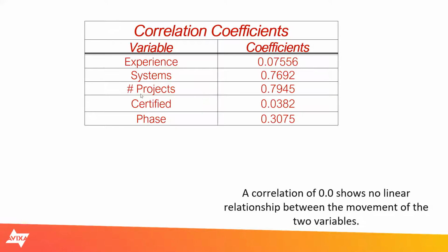But what we were able to see is that there is a direct correlation between the number of projects an organization does and the percentage of projects that require change orders, not just volume, because that's obvious: when you increase the number of projects, you're going to increase the volume of your change orders. But what we found was a direct correlation with a higher percentage when the number of projects went up. So the workload hit the organization more. I won't say harder, but